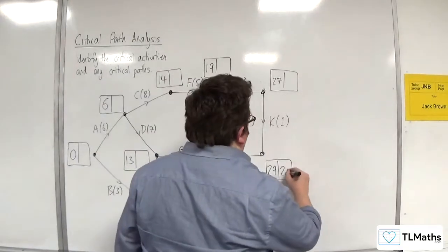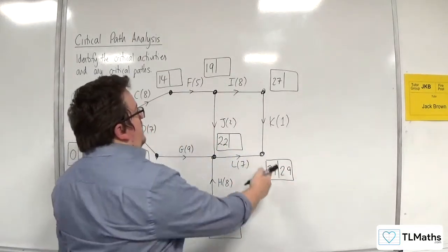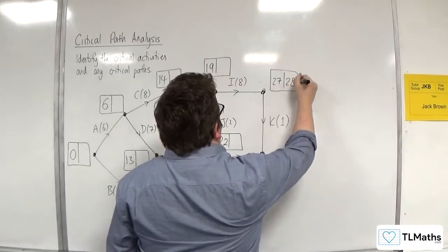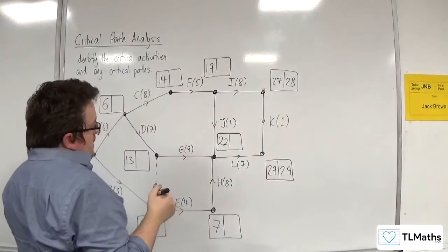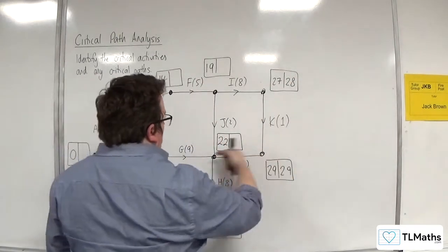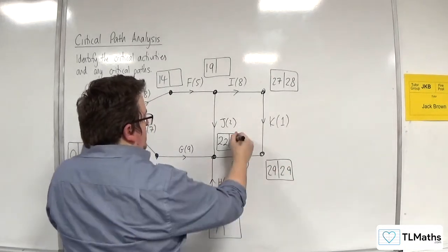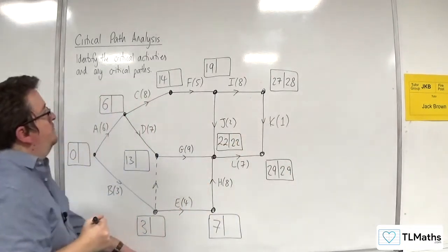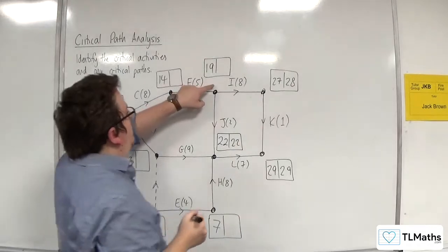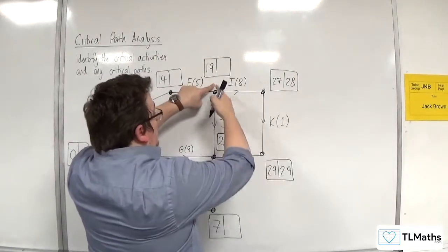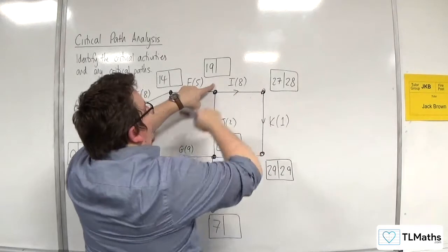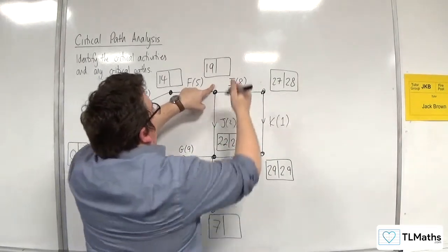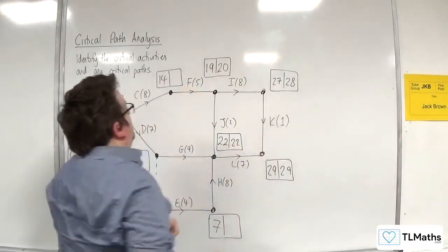Now the backward pass. So that goes 29. 29 take away 1, so 28. So we've only got one route going back. So 29 take away 7, so that's 22. So for this one, we've got 22 take away 2 is 20, 28 take away 8 is 20. Both the same, so I'll have to put 20 there.